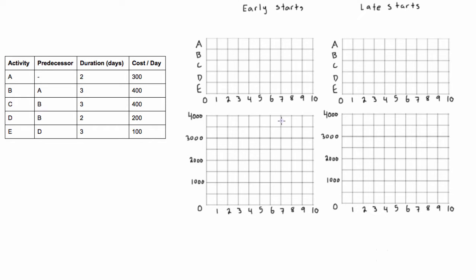In this video we are comparing the baseline curves, which are the project S curves for the early starts and the late starts for the same project. First, let's go through the Gantt chart for the early starts — we can read that right off the table of dependencies. Activity A goes from 0 to 2, B depends on A and is 3 days, C depends on B and is 3 days, D depends on B and is 2 days long, and E depends on D and is 3 days.